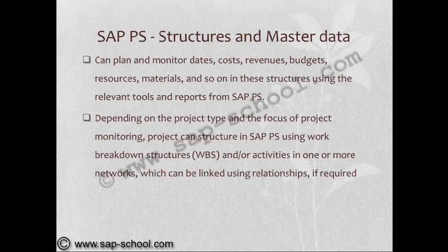Depending on the project type and the focus of project monitoring, a project can be structured in SAP PS using work breakdown structures and activities in one or more networks, which can be linked using relationships if required. So the structures and master data involve work breakdown structures and network structures.